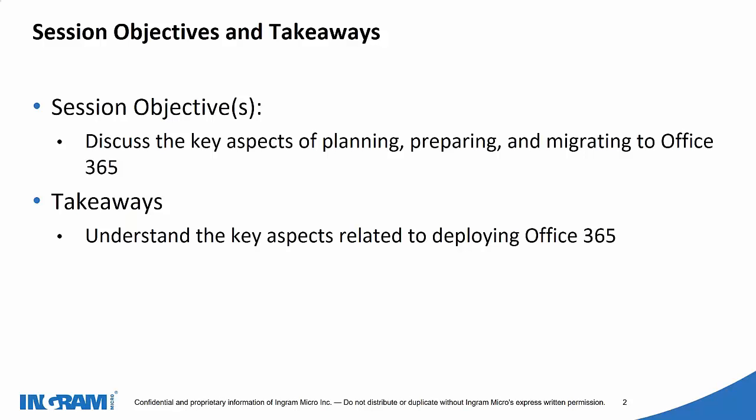In the preparation, you will do the things required, for example, creating the Exchange Online accounts, SharePoint accounts, link accounts, checking up the network details at the customer end for the migration, and setting up the accounts, and doing anything if they need any synchronization of Office 365 AD with the on-prem AD. And the last step would be the migration.